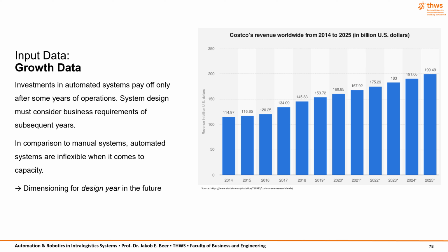Hence, it is advisable to look for opportunities to expand the system later. Rather than shooting down the project with an over-dimensioned system that's expensive and poses significant risk to the client, you may want to design a system that provides sufficient capacity for the next few years and can be expanded after that. This is easier with some technologies than with others. So if expansion is part of the project plan, you need to choose your technology accordingly to avoid major business interruptions and high project cost later.